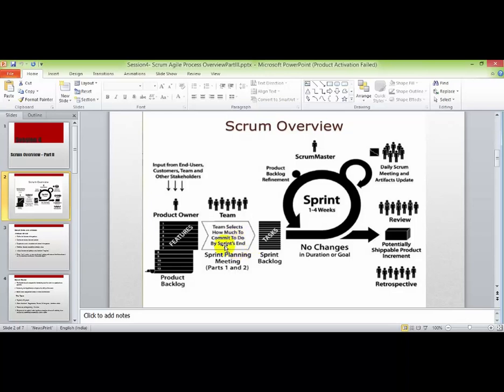Now, if you observe this, once you have all the backlogs, we will start with sprint 1. When I say sprint 1, I cannot pick all the user stories, all the issues from the backlog, in sprint 1 itself. Based on the time availability and the complexity, we will pick up user stories for a particular sprint.